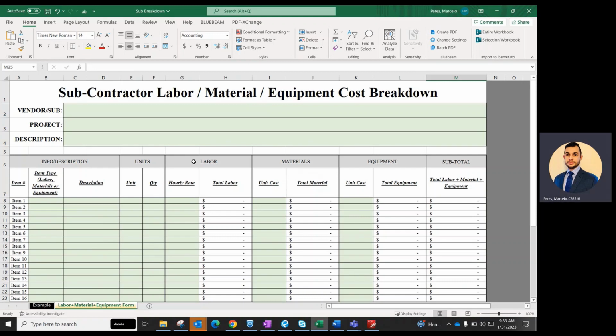Is the subcontractor showing their correct markup, which is 10% for subcontractors and 4% for the second tier of subcontractors? Is the labor burden reasonable? Do the subcontractors have formula errors in their proposal?